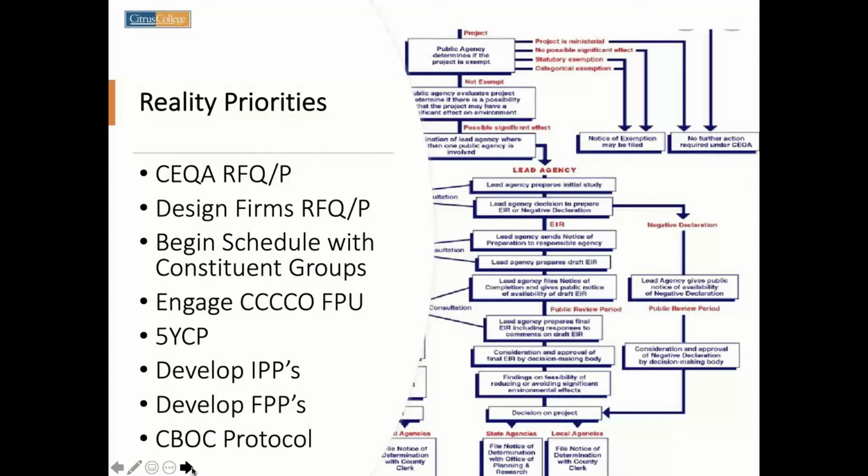So again, it's a description of the work that's going to be done. Your entire schedule gets submitted in there. An estimate of all the hard costs, all the soft costs, material takeoffs, everything is located in there. If you have a CM, you have to account for that. The Chancellor's office and Department of Finance see everything in there. And when you're doing a formal project proposal, almost every time it's because you're seeking state funding.